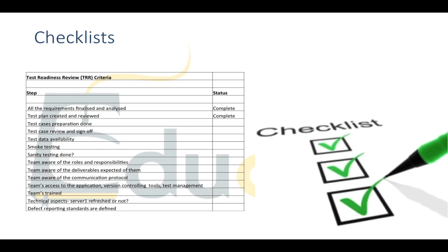Now, this is talking about kind of internal team communication protocols. In my experience, it would be great if each member of your team could send you an email at the end of the day that would just kind of outline the work that they've been doing for that day, and even give you a little kind of task list update as well to say, yesterday I had 10 items on my task list, today I've completed 2 of them, I'll be starting the 3rd one 9 o'clock in the morning when I start work.